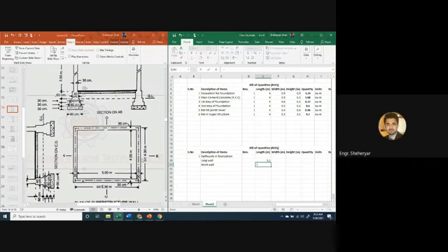4.4. Okay, how many long walls are there and how many short walls are there? 2 each. Numbers will be 2 for each long wall and 2 for short wall. Now, what is the width of the level? 0.9 meters.